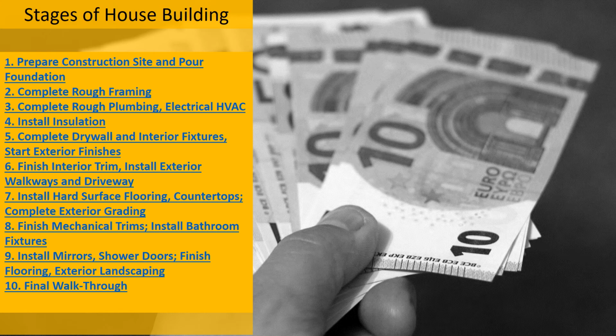So in a traditional approach, you would follow this kind of methodology. Some might overlap, and some you may be able to do at the same time. But there are some you cannot start. You cannot start number 2 without number 1 being done. Number 1 needs to be done before the whole project can be done, and before even number 1, obviously, the architectural designs, planning and permissions need to be done. So there are various things that need to be done before you can even start. So this is typical of a traditional or waterfall approach.